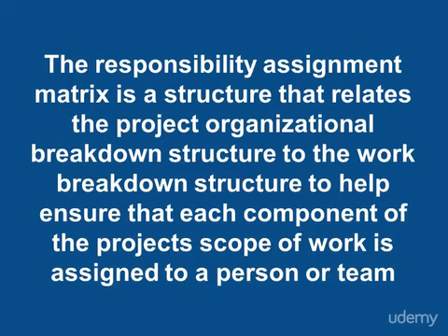The first of the three documents we want to look at is the RAM, the Responsibility Assignment Matrix, which is a structure that relates the project's organizational breakdown structure to the work breakdown structure to help ensure that each component of the project's scope of work is actually assigned to a person on your team.